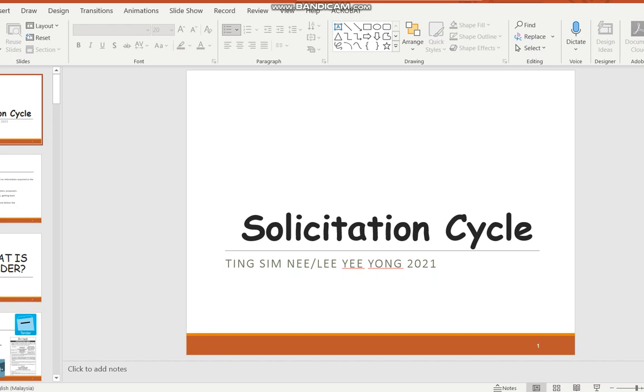This particular part of procurement management is dealing with solicitation. So after we've determined the relationship between the contractors, the service provider, the owner and the design professional, then we know that we've got to establish them in a proper legal relationship. Then after that, we are going to invite these people to come and give a proposal.